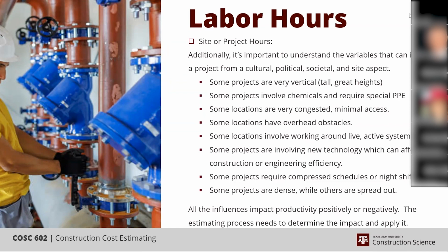So some locations are based on new technology, and that drives construction engineering inefficiency at times. Particularly if engineering is struggling to figure it out, and then construction is trying to work with that, construction's never built it before. Compressed schedules and night shifts tend to impact productivity if everybody's being rushed and the stress level goes up, or they're working long hours and tiredness is coming in.